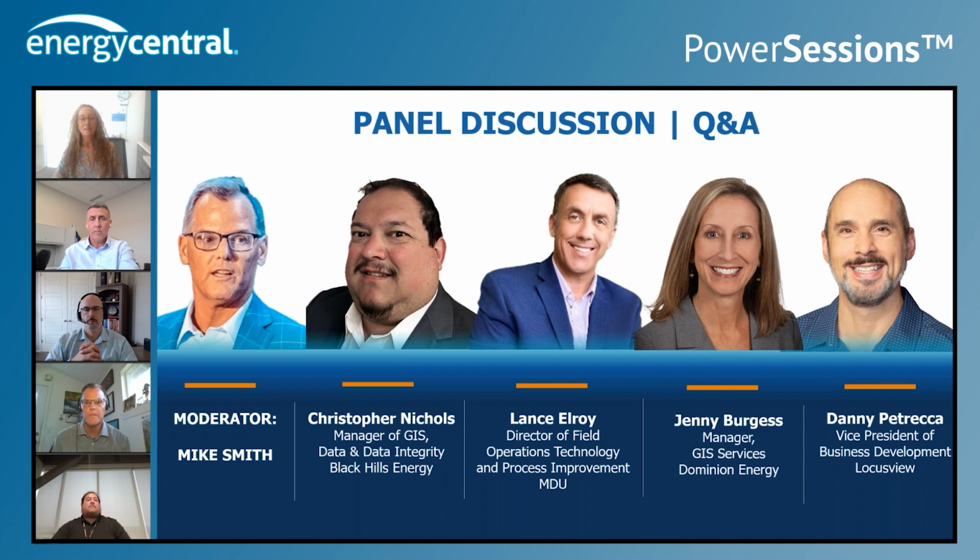So right, the slowdown there, I mean, the vast majority of the material that we use in a storm, we just charge to a generic storm number. So every bit of that is material that went somewhere and we don't know where. So if we have a recall and we're trying to use manufacturer and serial number, or if we have a pole inspection program and we think we've got a creosote pole, but we really don't because we had a storm and replaced 800 poles, we're wasting time inspecting things we don't need to inspect. So I think we've got off track a little bit.